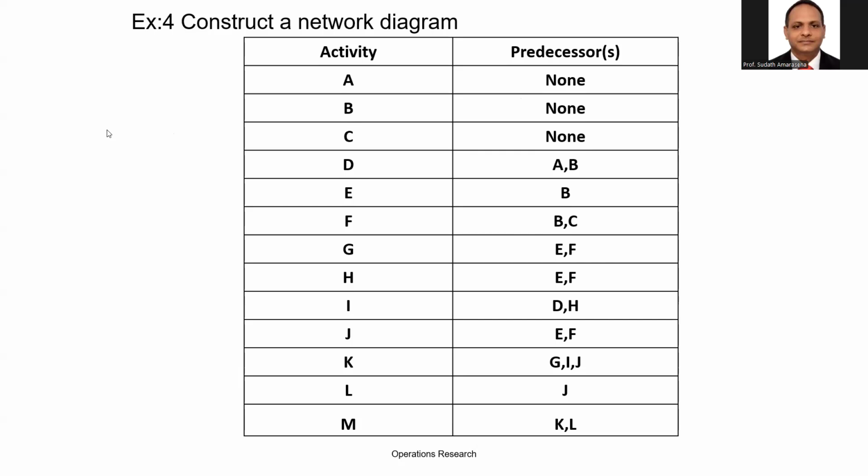Sometimes I mentioned, if you start more than one activity from the same event, you can't complete them using another same event. If the situation is like that, we should use a dummy activity. That's the only thing you need to know. Then I think the rest is not difficult. So easy. Go step by step.